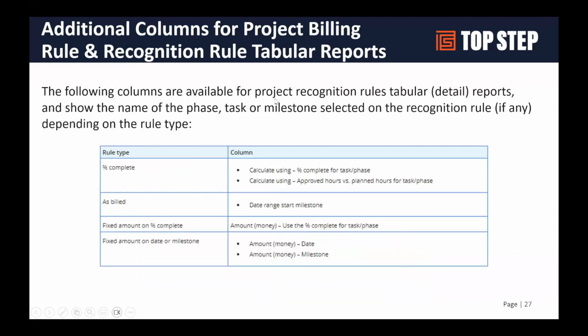And then there's also additional for RevRec rules. So if you're doing percent complete RevRec, you can bring in more details around how you're calculating the percent complete, whether it be percent for a task or phase or approved over planned hours. So you can bring that detail in.